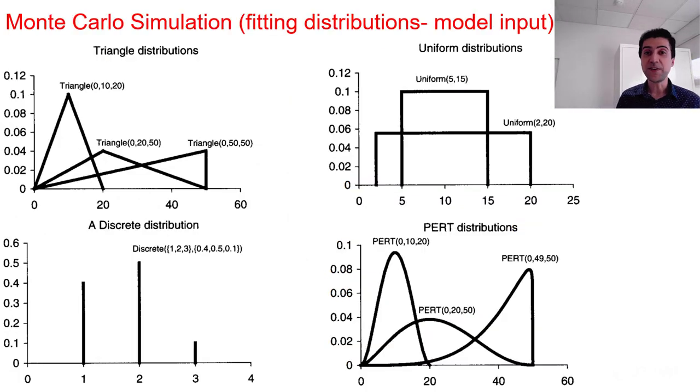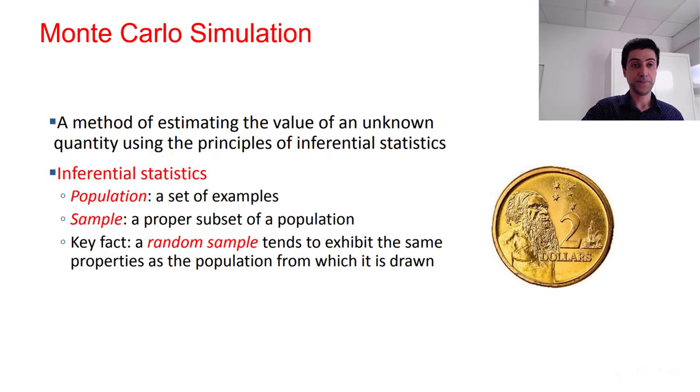In Monte Carlo simulation, we have more liberty to use other distributions than beta distribution. It is possible to use a range of continuous distributions including triangle, uniform, or PERT log normal distributions, and also discrete distributions. So Monte Carlo simulation is a useful method when we have a combination of different distributions in a complex problem at hand.